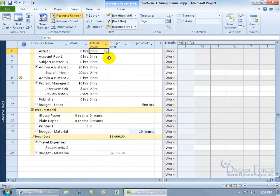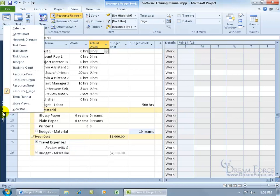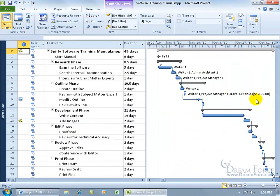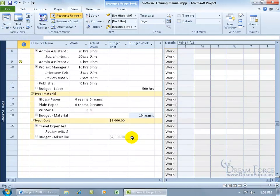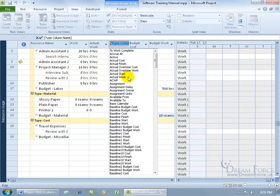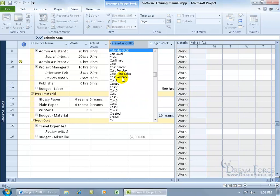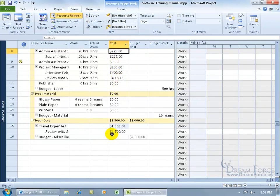That way you don't have to find one material here and another down there — it's all grouped together. Now, didn't we assign travel expenses at $1,500? Let's go back to the Gantt chart to confirm — yes, $1,500. So when I go back to resource usage and scroll down, how come it doesn't show $1,500? Because we don't have a cost field, only budget cost. Right-click on budget cost, insert a column, type 'C' for cost, select cost — and there it is: travel expenses, $1,500.